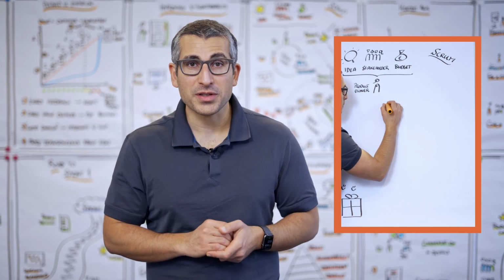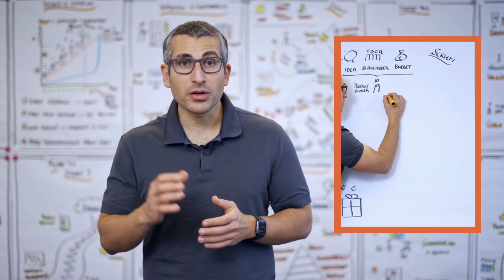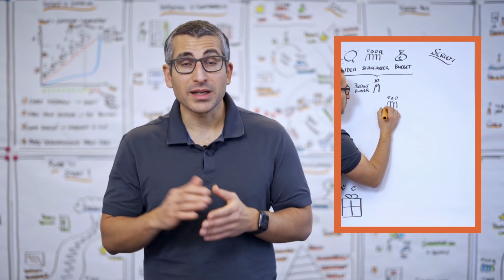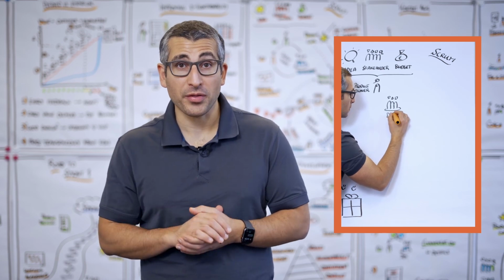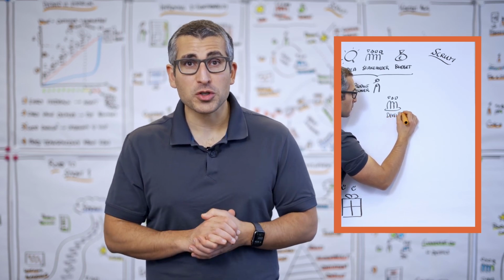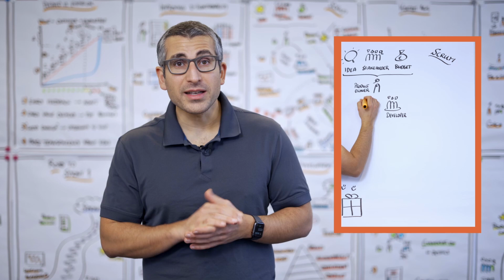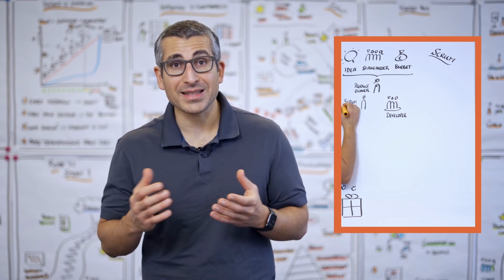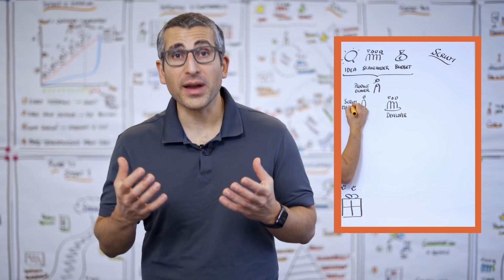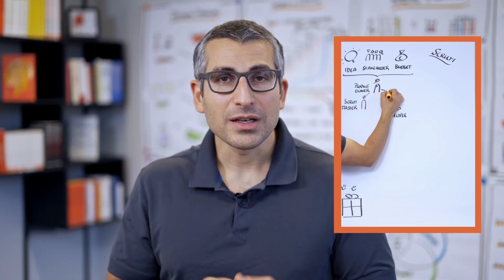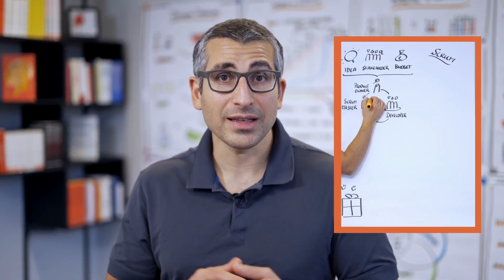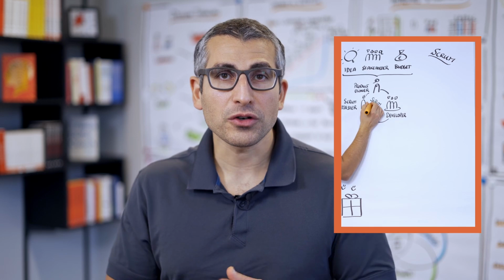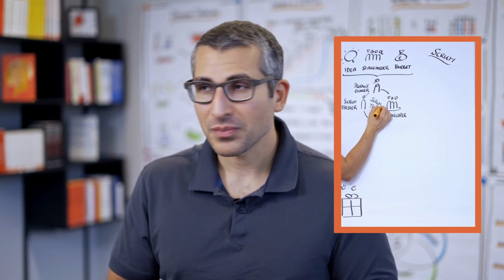That's where the developers come in. Product owners decide what we build. Developers decide how we build things, at least from a technical perspective. Now, one thing is missing: someone that works on how we collaborate as a group, how we become more effective as a team. Scrum Master, Product Owner, and developers together are referred to as Scrum Team.